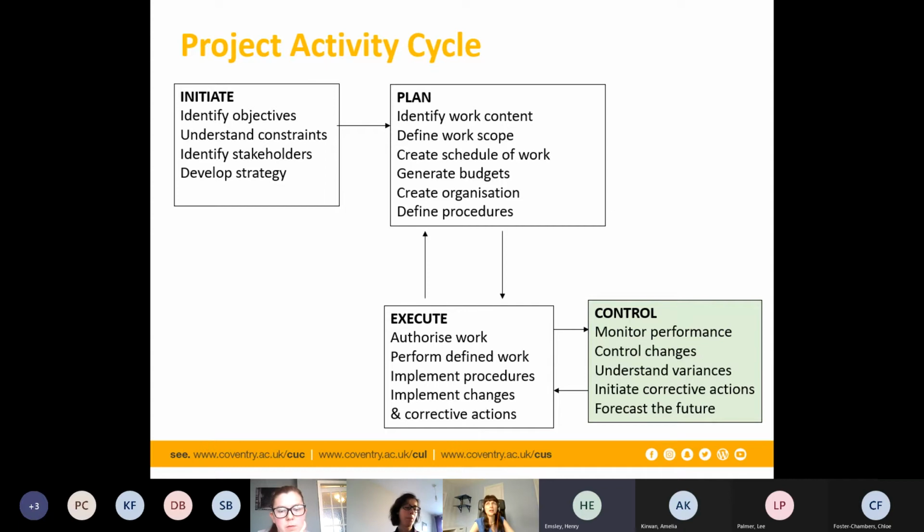How regularly is that information reported back? Every week I do it. I do a 3-week look ahead every Friday, and then every Monday I as-built the previous week. Yeah, okay, that's really good.